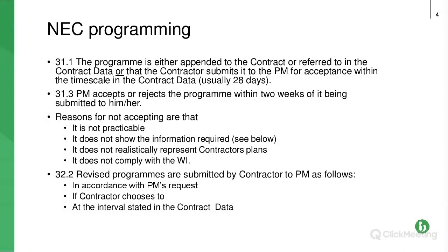Typically, it's 28 days. Now, my preference for contractors, subcontractors, the party having to submit the programme, is to append it to the contract, and you'll see why. But once it's appended to the contract, it's agreed between the parties. You're not submitting it for acceptance to the project manager, and then the project manager says, I'm not going to accept this. And it's actually very important to have an accepted programme at the start of the project. Without it, you're really going to struggle in terms of particularly compensation events and delay related to them.